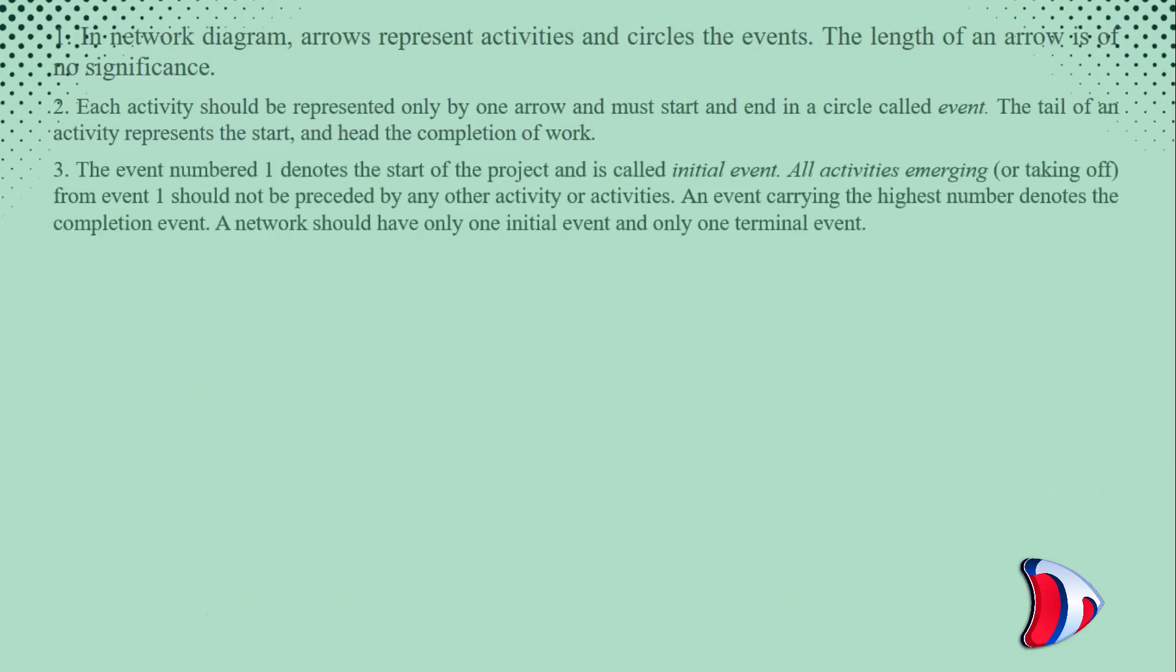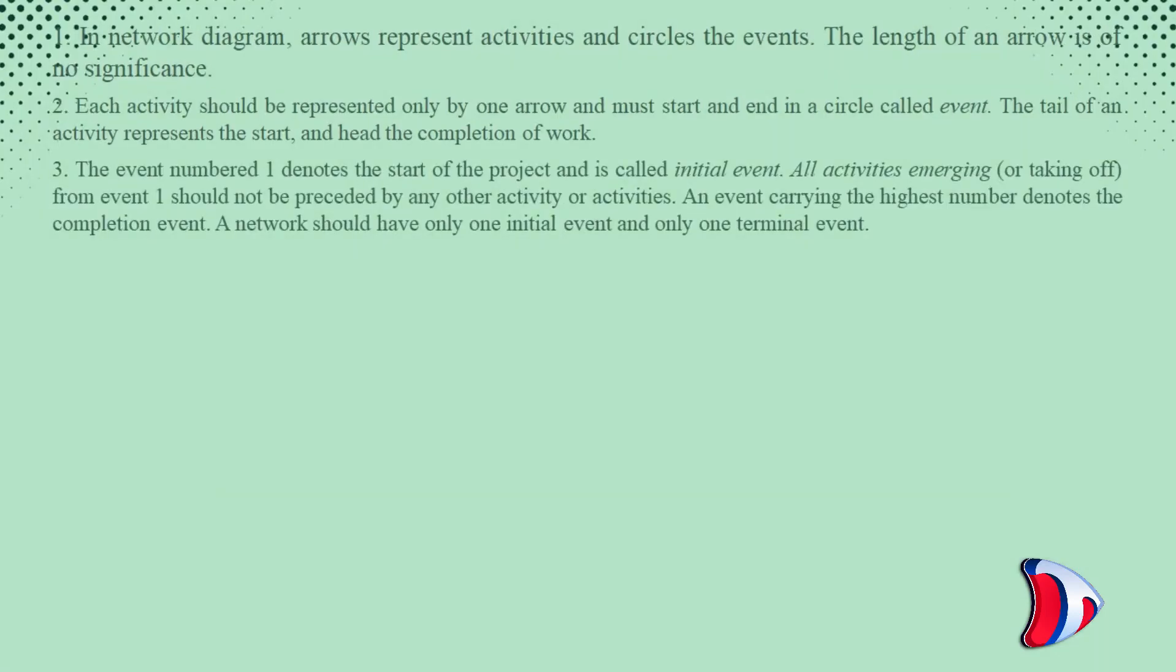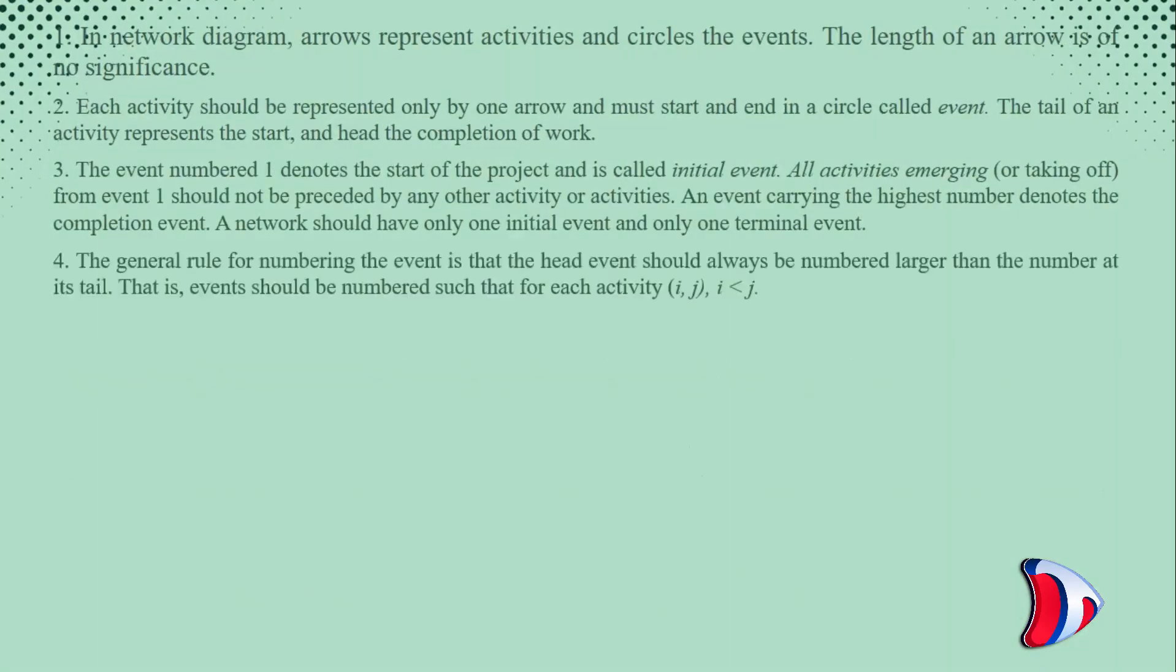The event numbered one denotes the start of the project and is called initial event. All activities emerging or starting from event one should not be preceded by any other activity or activities. An event carrying the highest number denotes the completion event. A network should have only one initial event and only one terminal event.